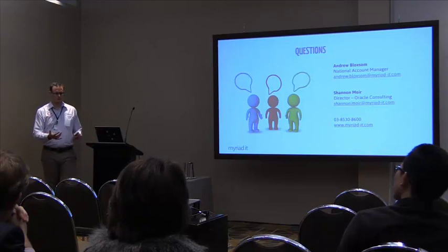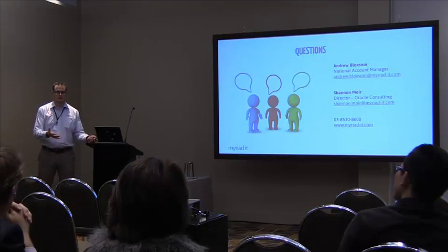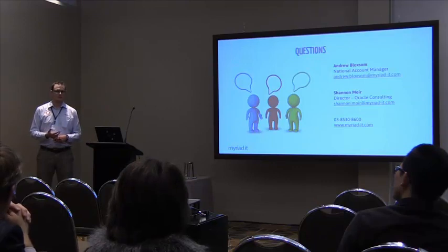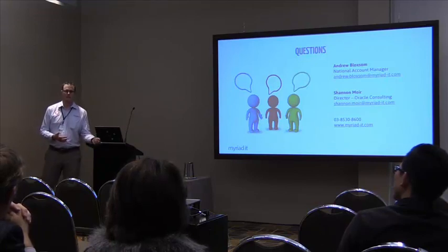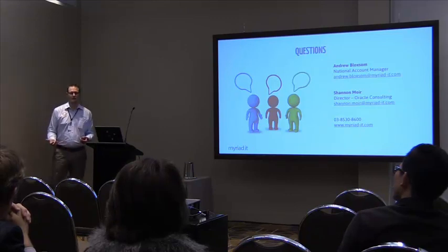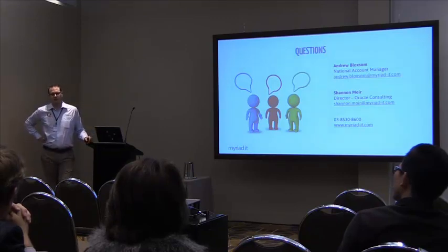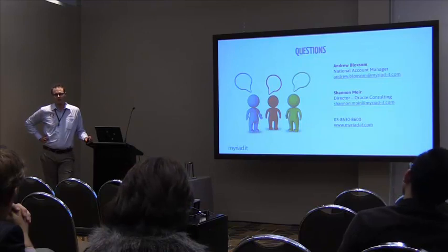Then you're only talking about what's changed with system administration and any process I've touched. But going from an 8.9 or 8.10 and jumping up into the 9s, you're going to expect more there. Then there's whatever's behind the scenes with changing the table structures. Is that going to impact any of my retrofitting? Is it referencing old tables that don't exist anymore, or have been renamed? That's what pops into my head straight away. So yes, there will be more time involved.